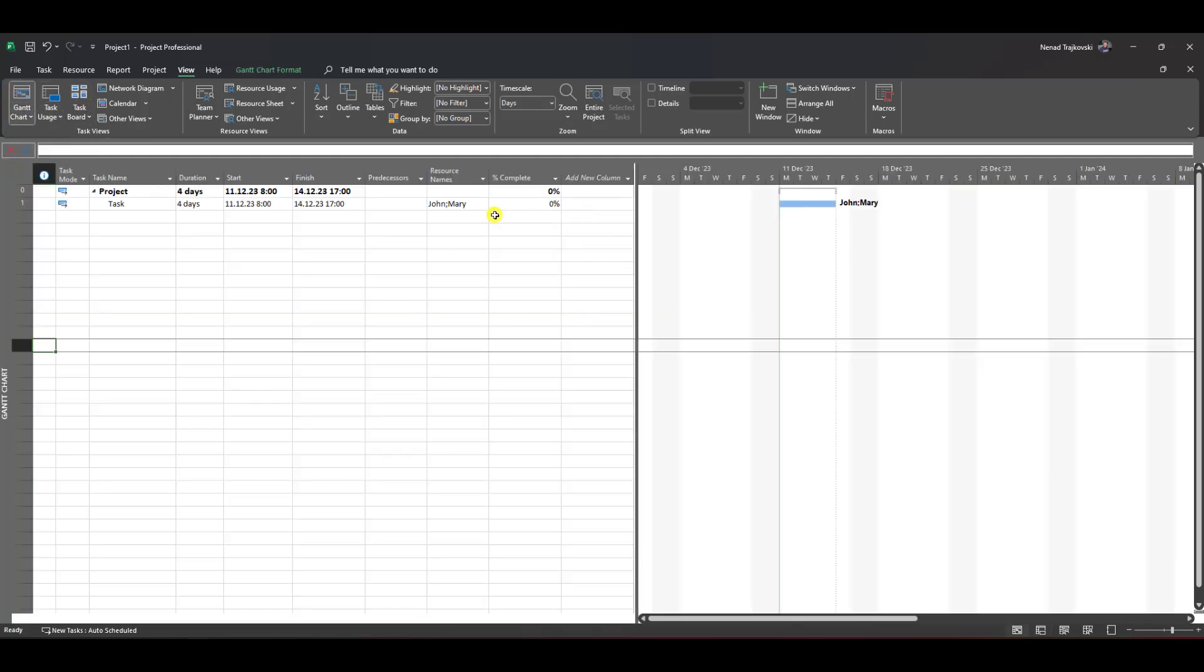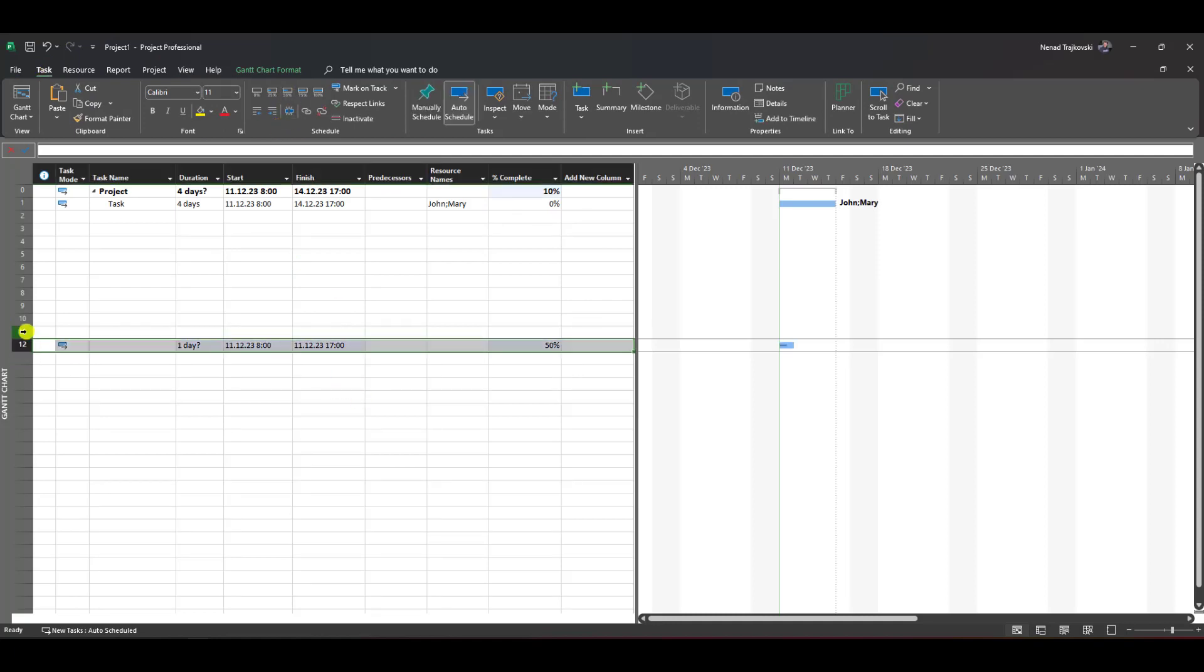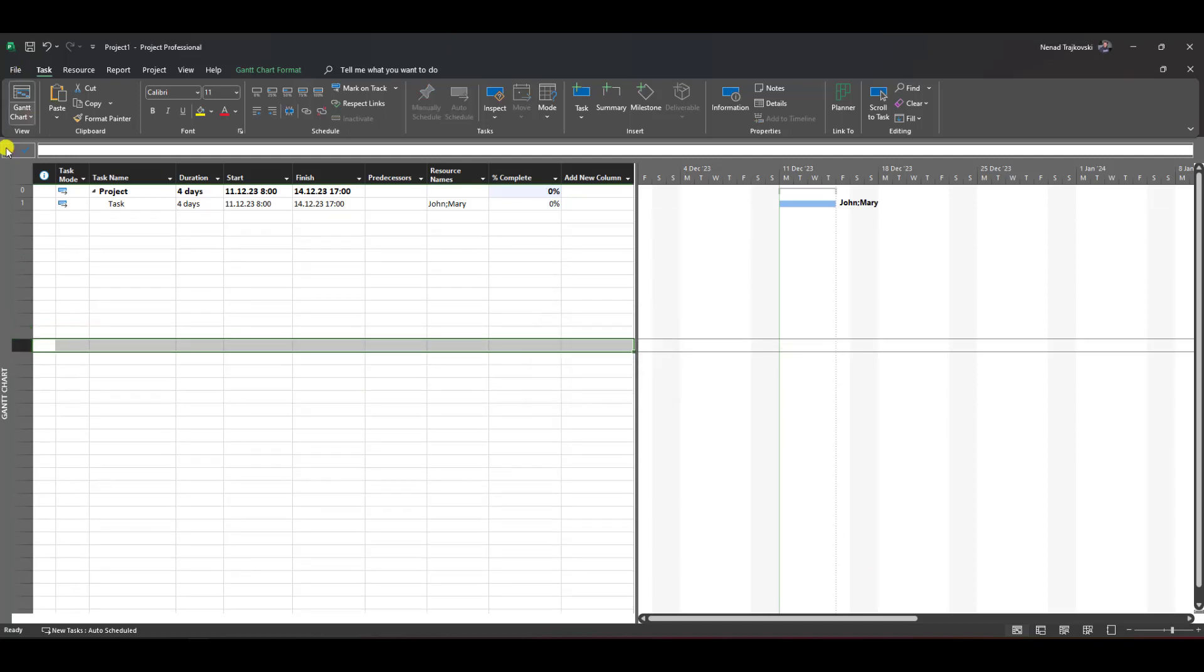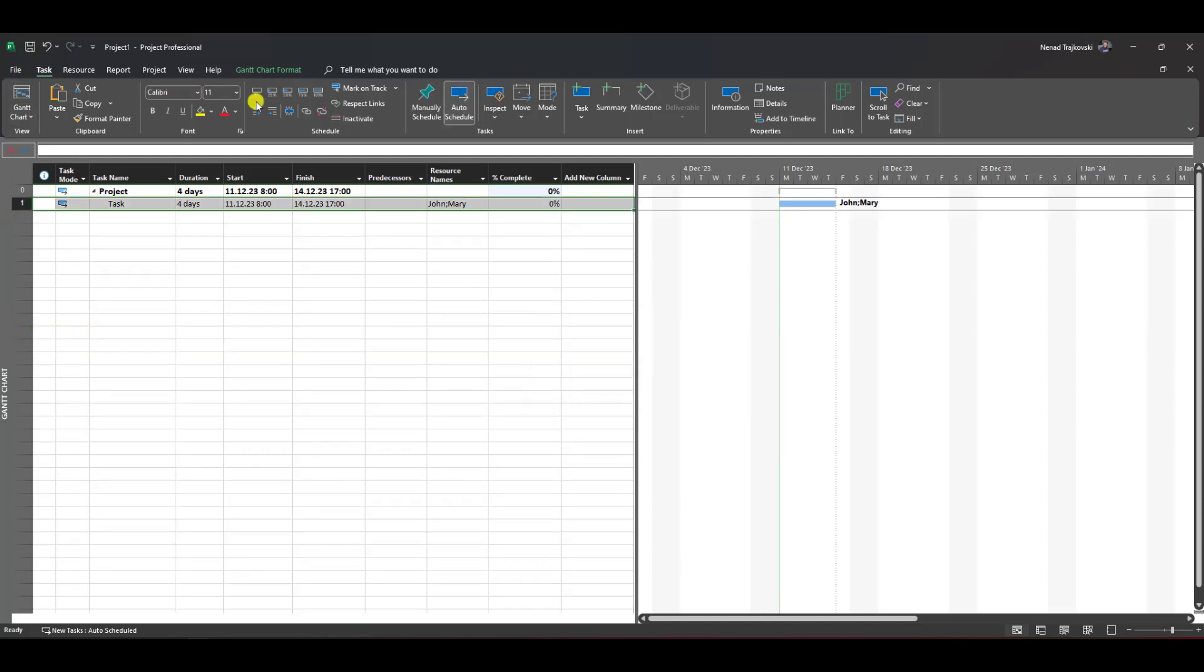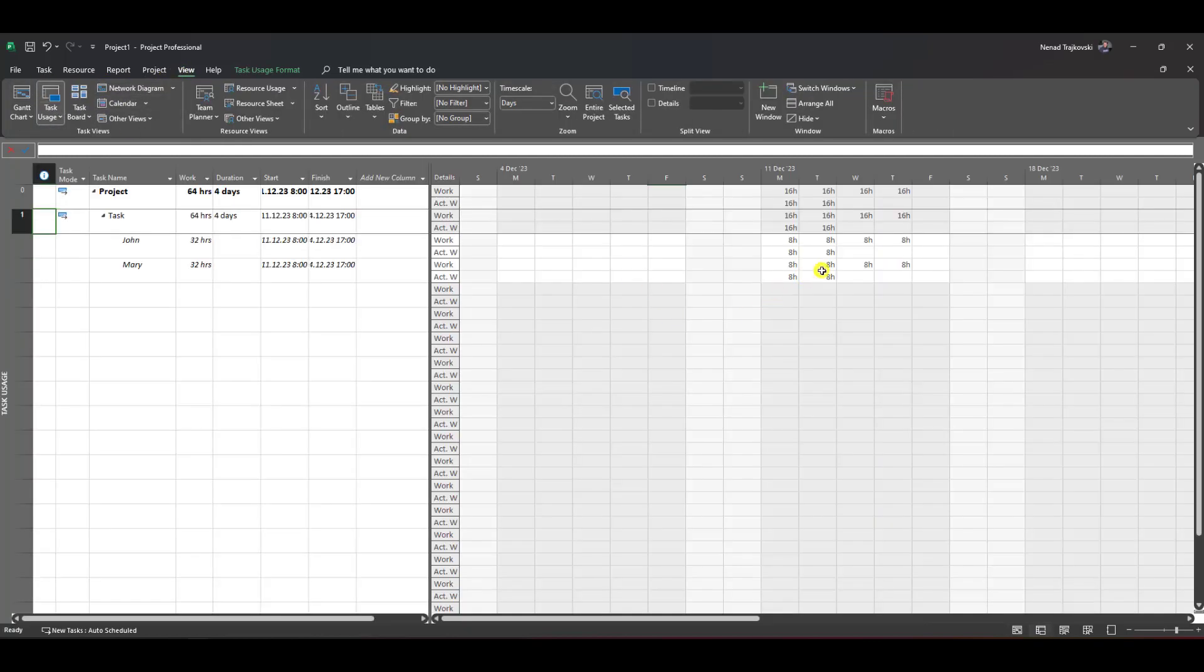Now I'm going to mark this task as 50% completed. Not here, this is wrong. I'll mark it here. You'll see 50% is completed, and if I go to Task Usage, the actual work is eight hours per day, so we have some progress.